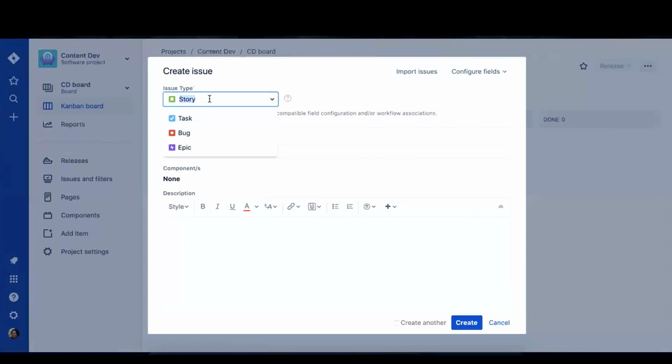Stories can have subtasks. Even the story of arranging travel plans for all the ambassadors might have sub pieces, like create a list of ambassadors to invite, verify that they can all go, get them to send you itineraries that they want to fly, and then book flights, send confirmation, whatever.